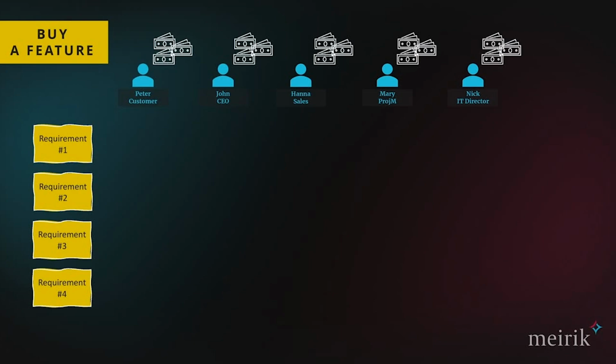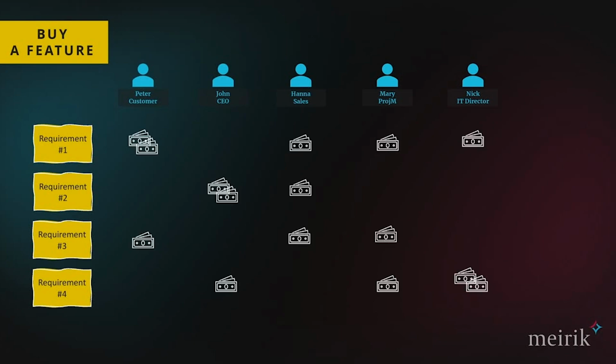If you are very interested in a requirement, you can put way more money on it. If you're not interested in a certain one, perhaps you will leave no coins, no notes over there. And that's it. Each of the stakeholders starts the thinking process, the voting process, that ends up with a distribution of money. In some variations of the game, actually, you can allow your stakeholders, after the first round of voting, to start collaborating.